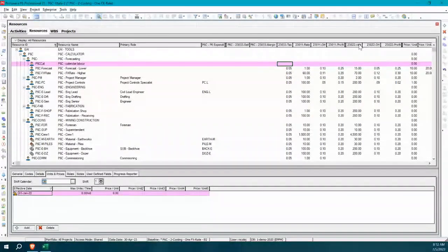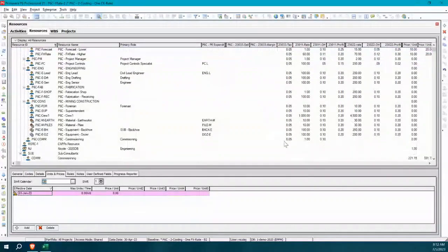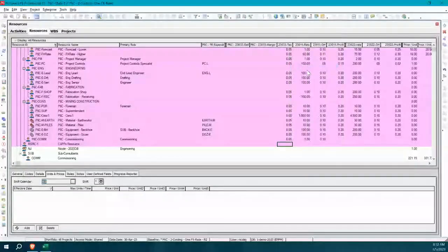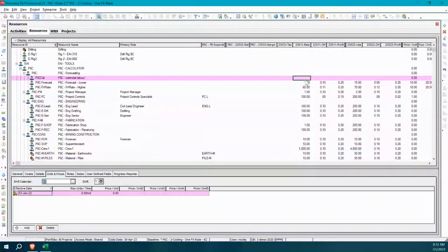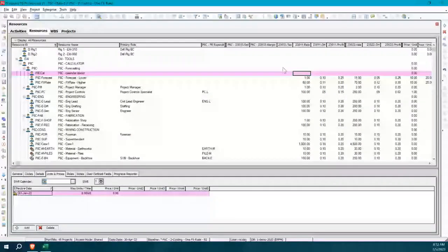So we can have a broader grid of rates that is specific to each project and managed by that project. That's something that is lacking in P6. So we're using out of the box functions to expand what you can do inside of P6. Each project can have its own set of rates, as well as other things that you want to use to go from your cost.